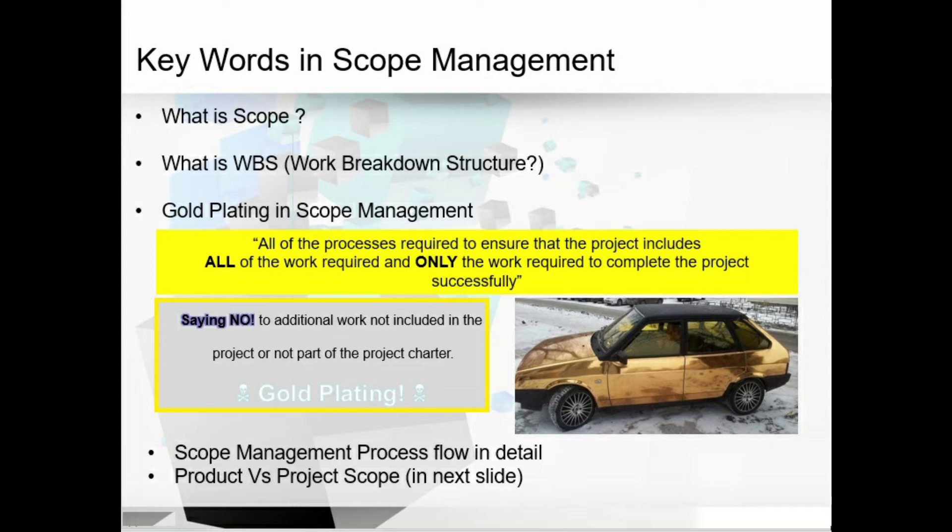This tool enables you to clarify and identify scope as well as find additional scope. The requirements must be evaluated against the business case, ranked and prioritized to determine what is in and what is out of scope. Moving to gold plating: it means intentionally adding extra features or functions to the product which are not included in the scope statement.